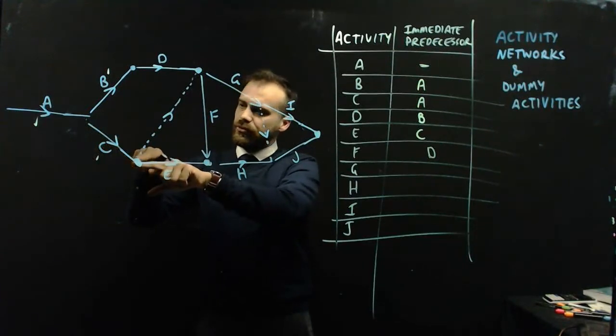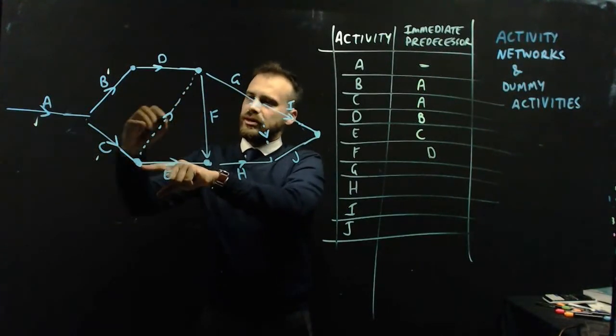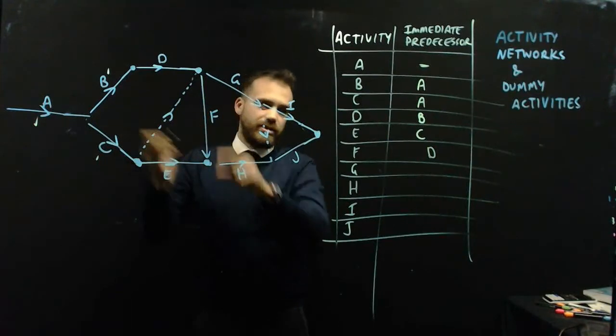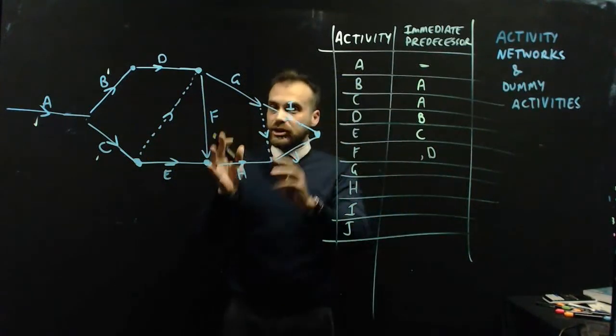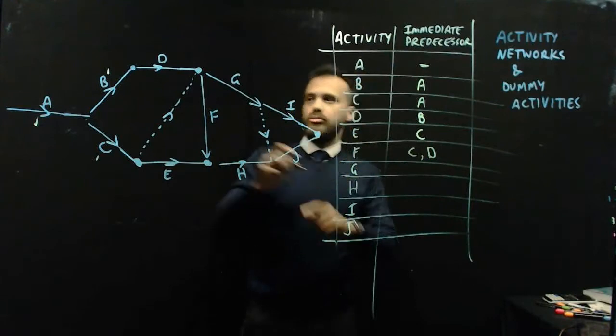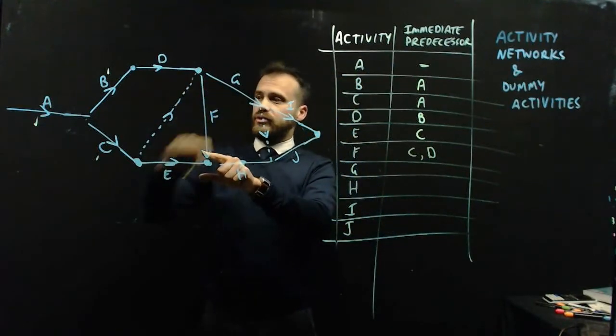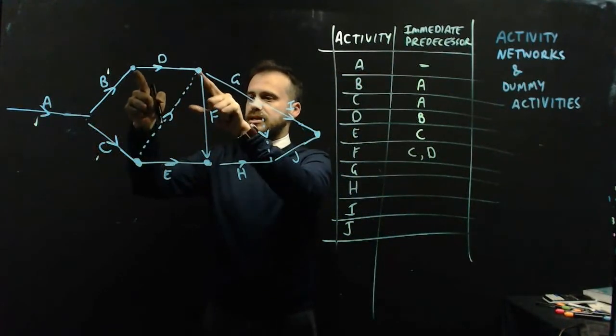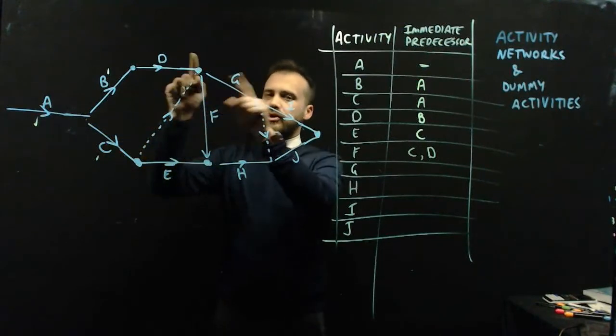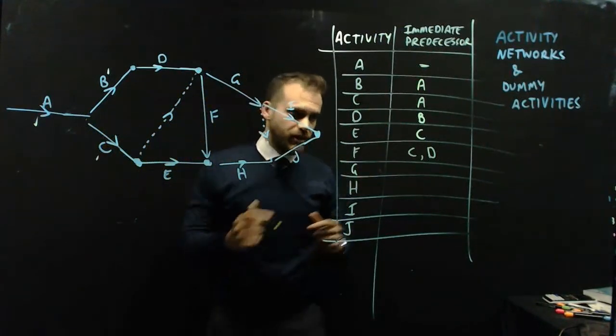So we can call it like C in a bit or something like that. But it's actually just C. Before you do F, you have to do C and D. We just can't draw two lines with C. So we use this thing, a dummy activity.